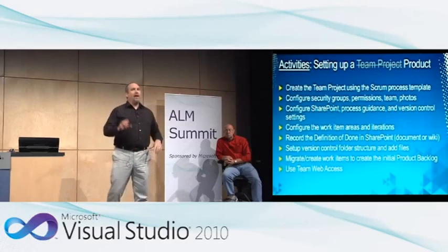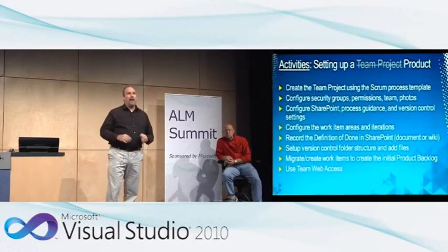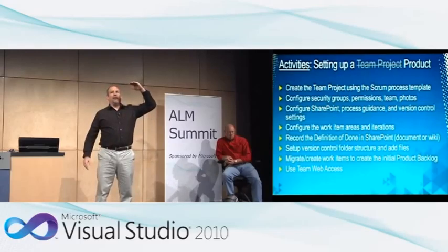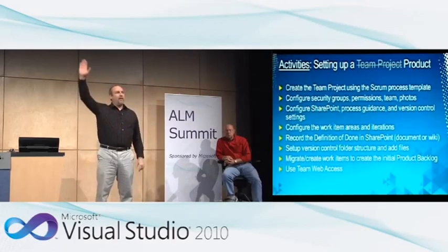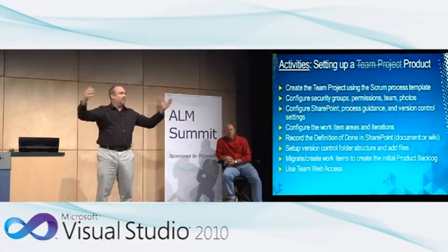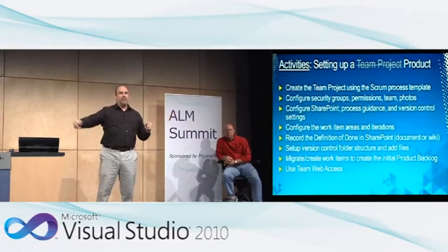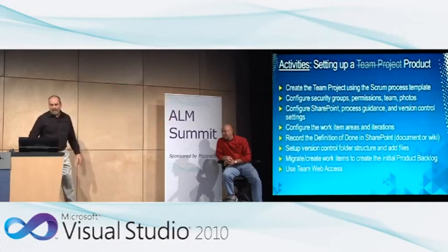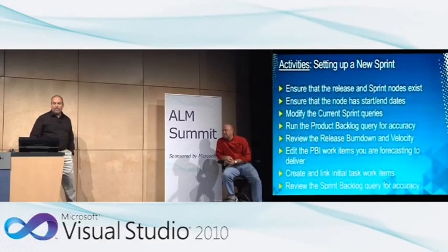And some of the items in there actually describe other items. I've been asked to help people set up initial product backlogs, and I find item 1 looks like an actual feature, a PBI, but 2, 3, and 4 just further describe number 1, so they should become maybe acceptance criteria around that. How many of you have gone through that exercise in life? Putting together a backlog from a bunch of disparate systems and sticky notes and spreadsheets and Bugzilla, and yeah, that's not fun, but you got to do it, and that's kind of that pre-game set of activities.